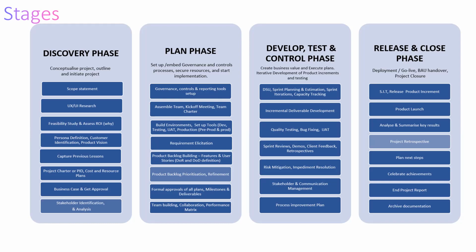Okay. So, which means in your develop and test, what are the things that you want to do? Your product backlog was created in your plan phase. Yes. Your team building, collaboration, performance matrix in your plan phase. Yeah. So when you now get to your development stage, you have your daily stand-up.